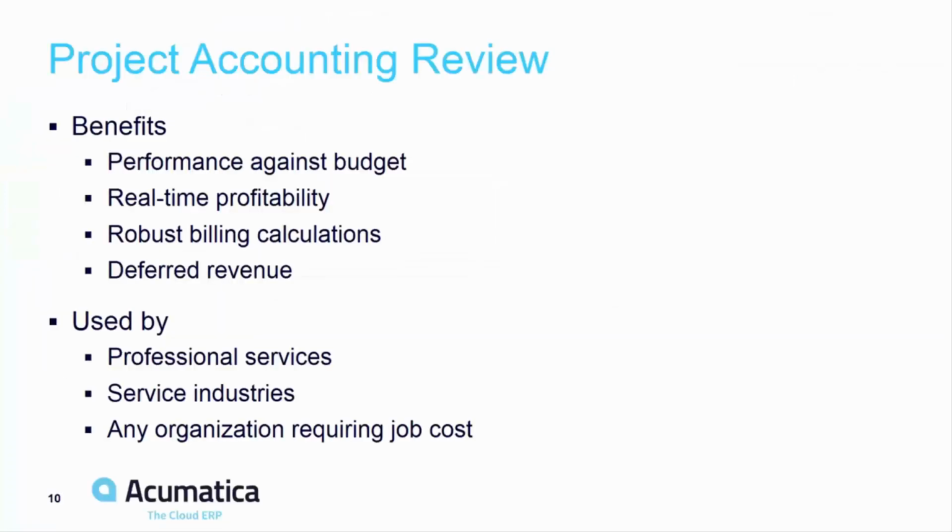In this video, we demonstrated how project accounting provides a real-time view of project profitability and a comparison to budget. By showing a fixed price project, we showed how to be GAAP and IFRS compliant according to the percentage of completion revenue recognition method.